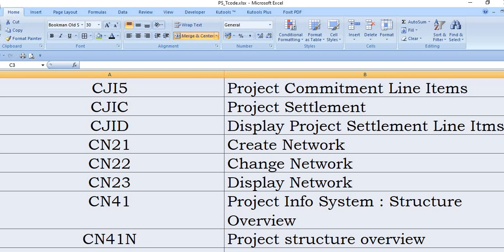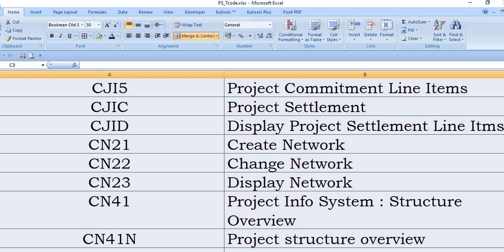CN41 is project info system structure overview. This is a very good transaction code. In CN41 you can display your summary in project, what are the materials you have planned in the project, how many line items, how many WBS elements you have planned, in each WBS elements how many networks are there, in each network how many services, how many prime costs, how many overheads, how much amount of the overhead you have planned.